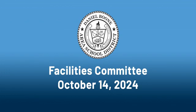Well, I mean, at this point, we're going to vote on one of them, correct? Or do we vote on a do not exceed dollar amount? We could vote on a not to exceed if you wanted. 13,000 would be the not to exceed. And then as long as we have the full scope of work for the meeting at the end of the month, when we actually vote on it, right? Right. I wouldn't mind pushing a not to exceed 13,000 out of this meeting. Okay. I will make it work. I'll get that to you. All right. It was a little thin, I'd just like to see a little beyond that.